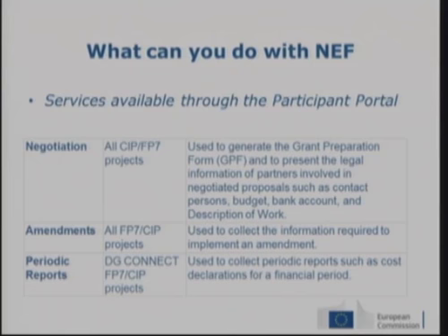Do you have any other questions for this part? Well, I guess that you are already familiar because you have been going through these processes. So let's go to the third part, which is more relevant for you because it's what most of you are going to be confronted with right now, which is the periodic reporting. As you see, reporting during the course of the project: deliverables you can send by email, and in the periodic report sessions, you have 60 days since the end of each periodic report, which is Article 4 of the Grant Agreement.